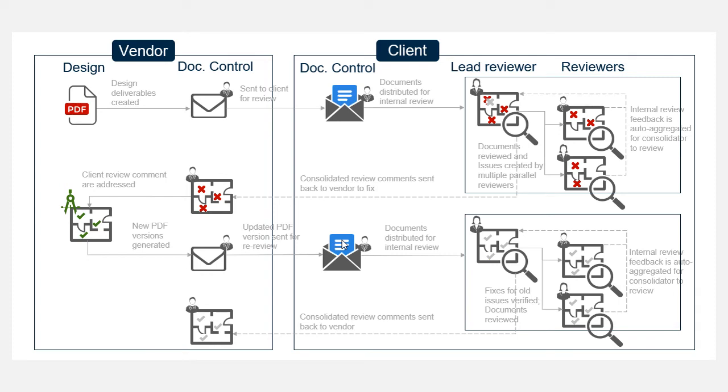This Bentley provided diagram shows a typical start-to-finish example of how users from 2 different organizations, in this case a client and vendor, can work together using ProjectWise Deliverables Management to review a document. The term for an outgoing package of documents is transmittal, and the term for an incoming package of documents is a submittal. It is the same deliverable, it just has a different name depending on whether you are the sender of the package or the receiver of the package.